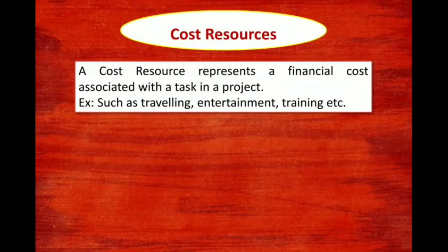The labor training will be done about how exactly the safety measures are to be adopted and all. So whatever you spend there, you can show it as a cost resource. It represents the financial cost associated with the task that you need to account for. The value of the cost resource does not depend on the amount of work done on the task or on the duration of the task. Okay, so it is independent of that.